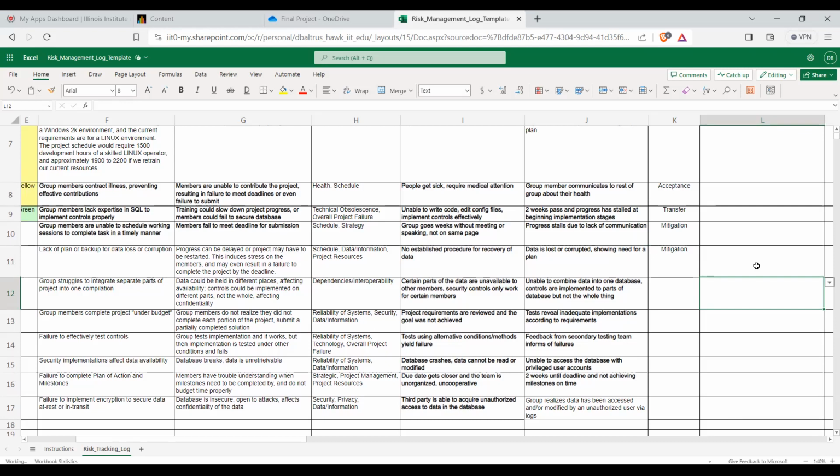So what would be that versus mitigation? Would mitigation be after it happened, we stop it? Correct. Okay. But the problem is that creates a risk in itself, because now you went to hire this outside personnel. They're going to be super expensive, and now you have the risk of going over your budget. Okay. Maybe you're right with that other one.